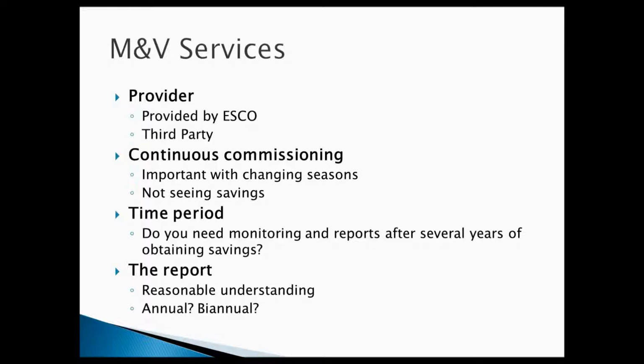Most often, this will be the case in new construction where you don't have a baseline established, or when effects from different ECMs impact each other. So measuring them independently isn't going to give you the kind of information you need.